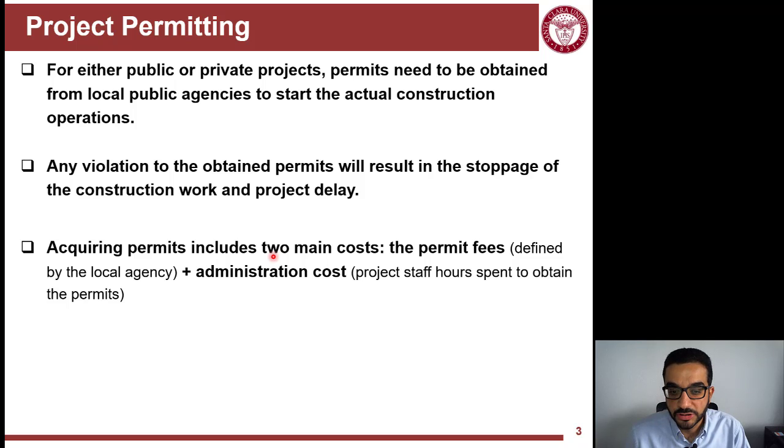So we will touch more on these, but there is the planning process to approve you to build in unintended or in a zone that you're not allowed to be in. Like you're building a retail building in a residential area, for example. And there is the building permit, which deals with making sure that you're using the correct building materials and methods to construct that facility. So for both, there is the permitting fee.